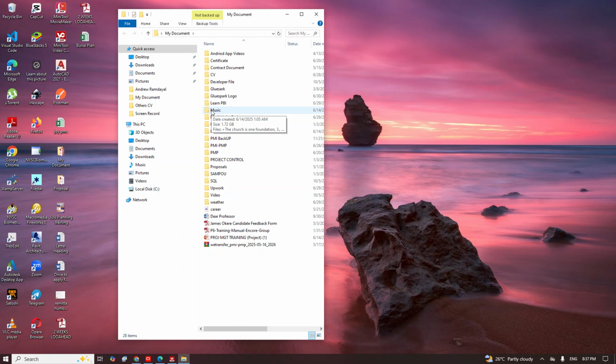It's just a game of interest. You just add some formatting, right? Then on the fourth step, you have to now do the cumulative calculation. Then after the cumulative calculation, you do what we call the percentage calculation. But all these can be done with one formula in Excel, right? And at the end of that, you plot your graph and format your graph. That's just all.